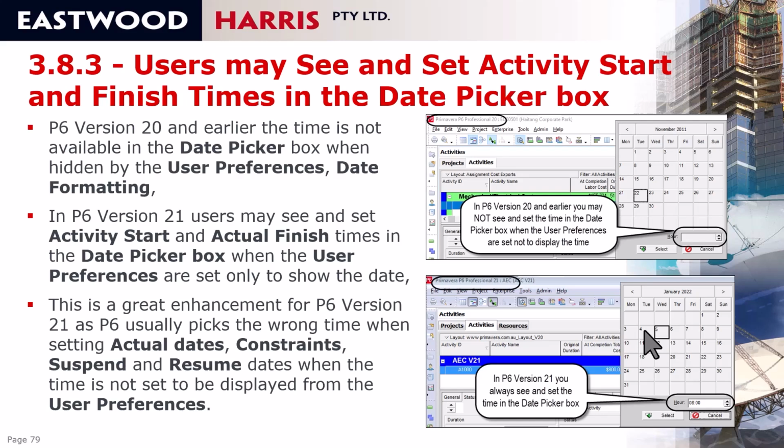This is a great enhancement because, as I said, P6 usually picks the wrong time when setting actual dates, constraints, and also suspend and resume. But I do recommend that you still show the date in the columns as well. Let me show you how this works.